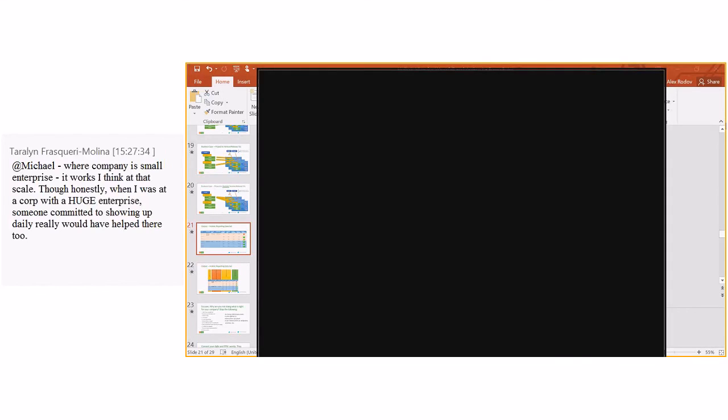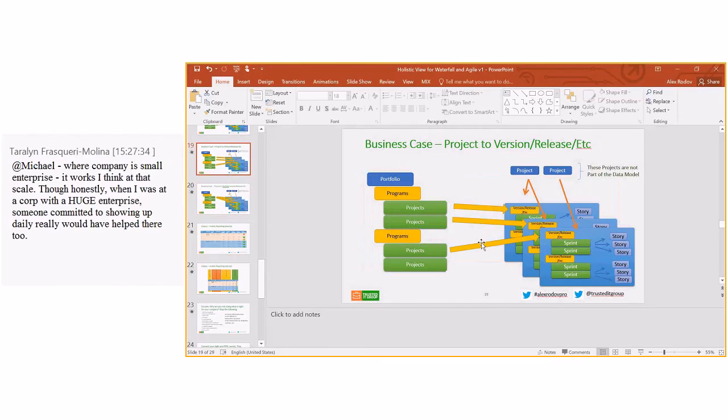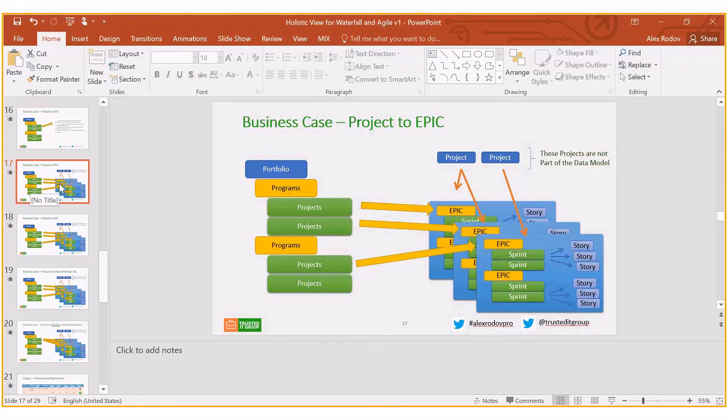on the picture I was showing. The first two layers of the Agile, which is project, epic, or feature, where you don't have to get down to the story level, but you can understand how many sprints and teams you need to involve to get these epics, these initiatives, completed. So that's another way of looking at what you just described, from the Agile perspective versus from the classic project planning perspective.